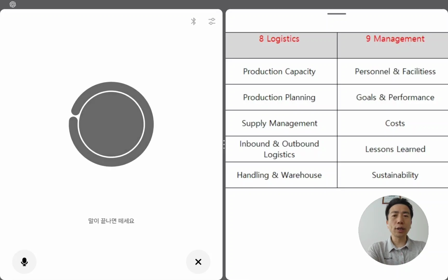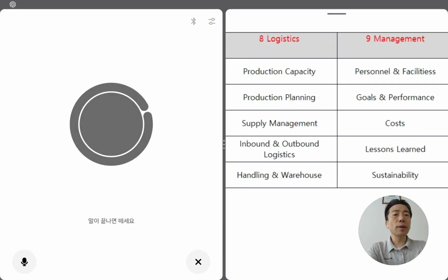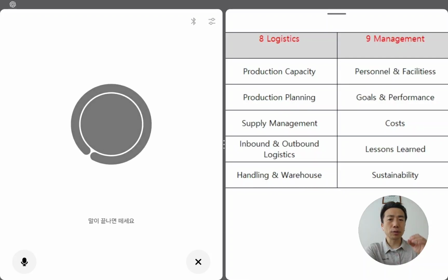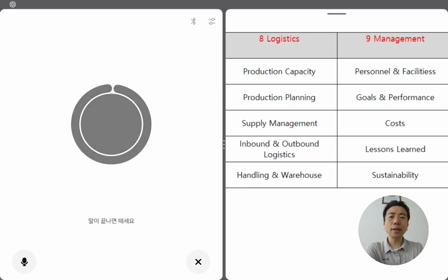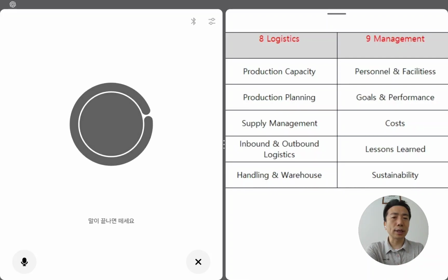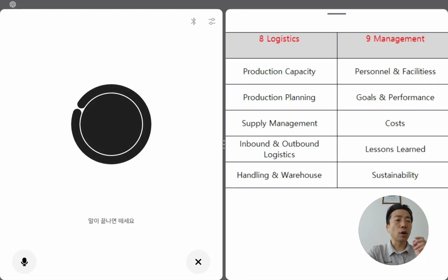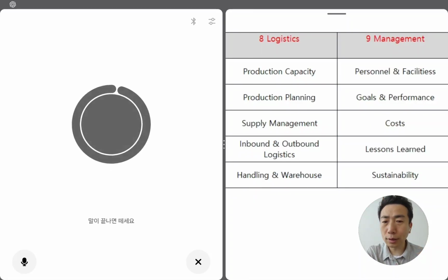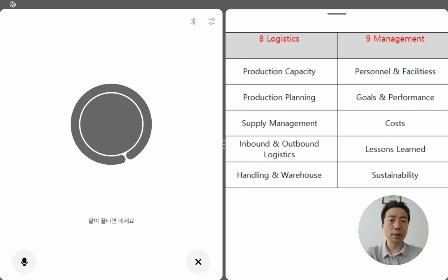First, I collect all issues that occur from development through mass production. This includes both major and minor problems across the process. We maintain a complete issue list. And then our multidisciplinary team, or MDT, reviews it regularly.